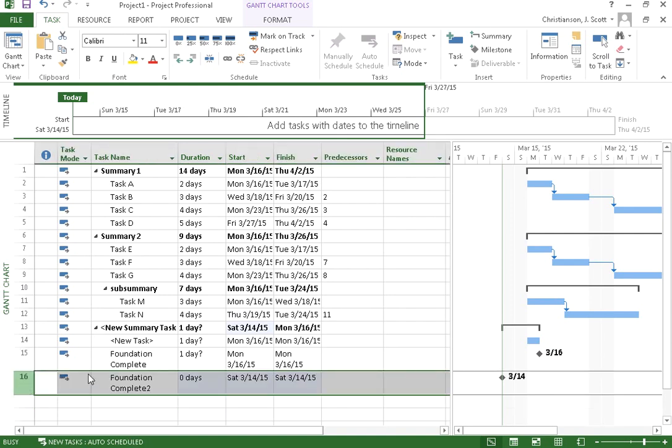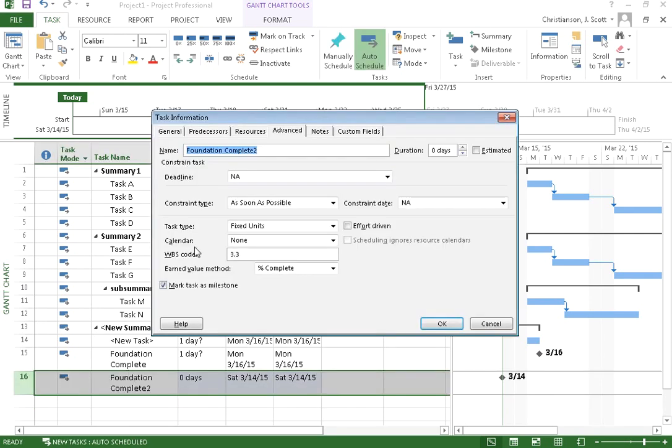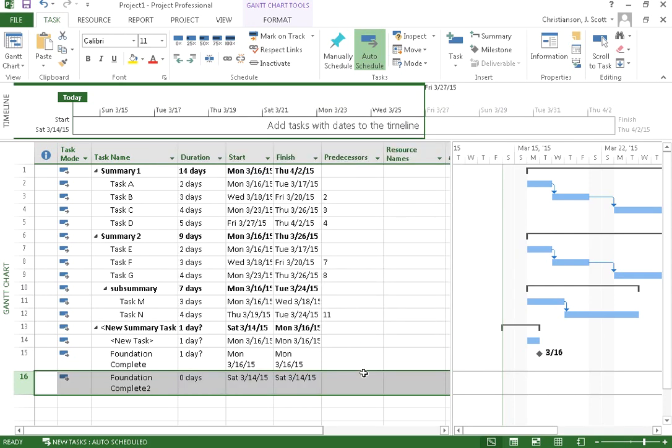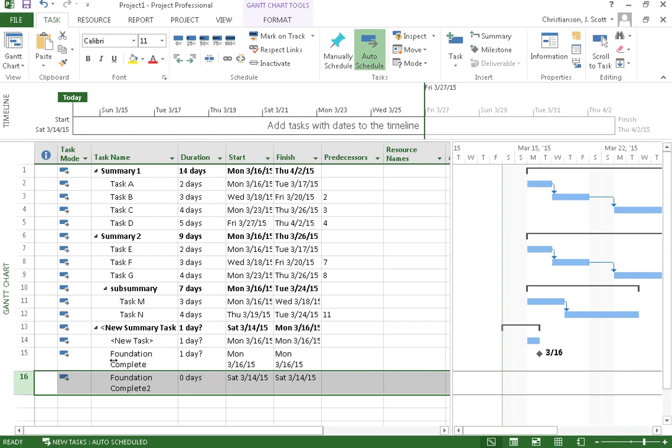If we want to change that from not being a milestone, we can just double click on the task information dialog and uncheck that marked task as a milestone. So hopefully that gives you some ideas of some of the things that we can achieve with our tasks and some of the more advanced ways that we can organize our tasks in our project.